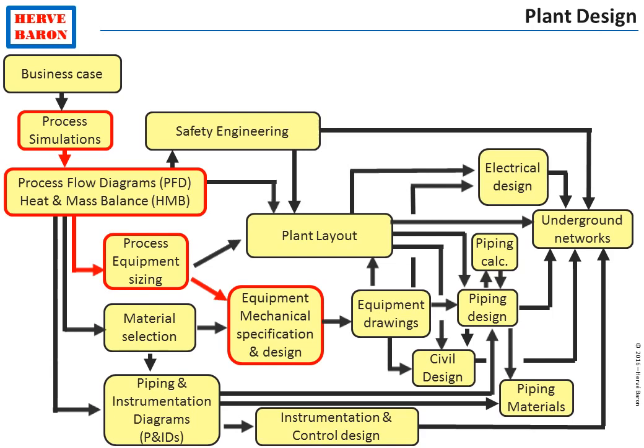It goes through the process simulations and process sizing and preparation of the material requisition, technical bid tabulation, and equipment purchase.